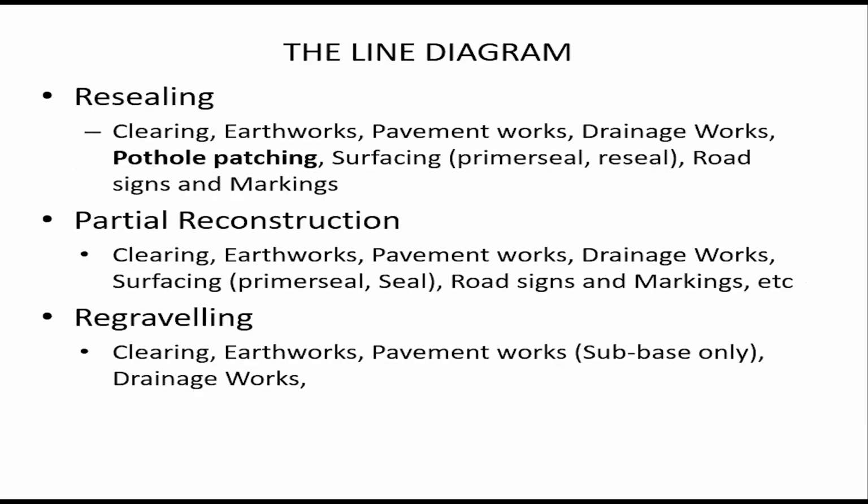Now we go to resealing. Under resealing, you do clearing, earthworks, pavement works, drainage works. Then you also do pothole patching if they are there.